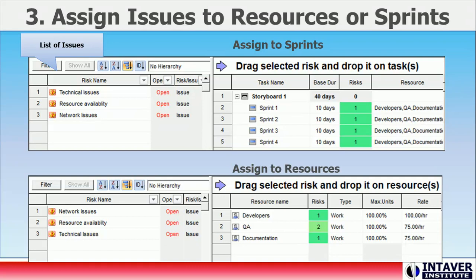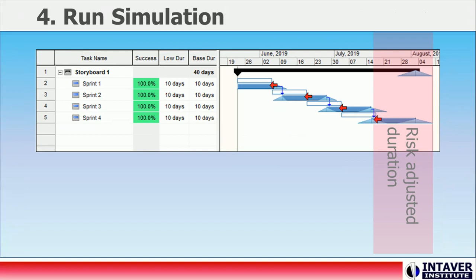Issues can then be assigned to either specific resources or to the sprints. In the first example, both the QA and documentation resources are shared with other projects, and availability to the project is an issue. In the second example, the team anticipates there will be significant technical issues to resolve that may delay the delivery of specific requirements. During project execution, issues can be added or closed as each sprint progresses. Once issues have been assigned, a quick calculation is run to show how the issues might affect the planned work in each sprint. The results can be used to modify the development plan.